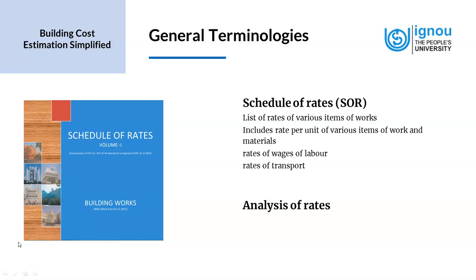So for our purposes, sometimes we might just use the rates directly from the schedule of rates that is provided, especially for building projects, especially for government building projects. We use a PWD document to take the rates, and then those rates are used to quote for a project.